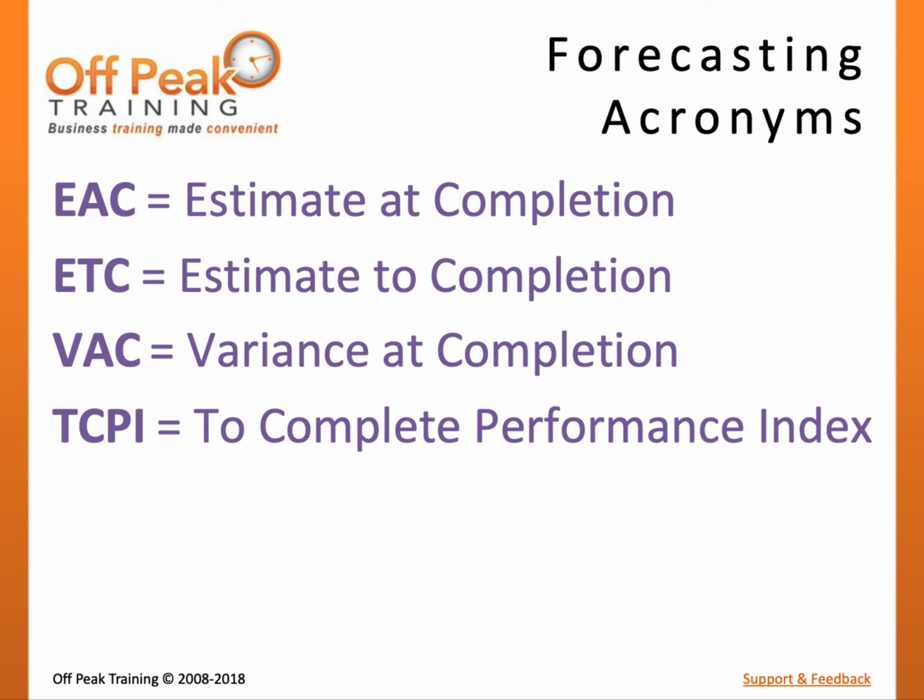However, imagine a scenario where we are over budget. Now for every dollar spent, we must earn more than $1's worth of work to finish at the original plan. In this scenario, our TCPI might be 1.15. You can think of this as meaning we need to give 115% work efficiency in order to finish at plan. Now let's look at the formula for each type of forecast.